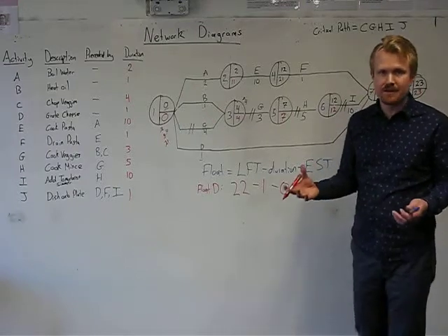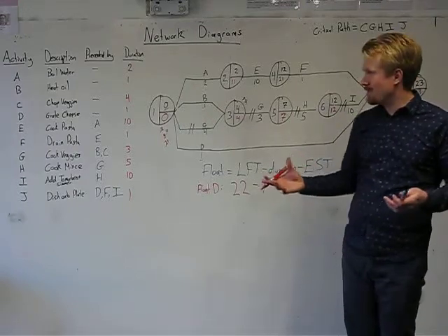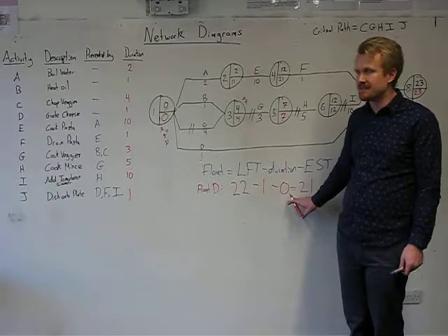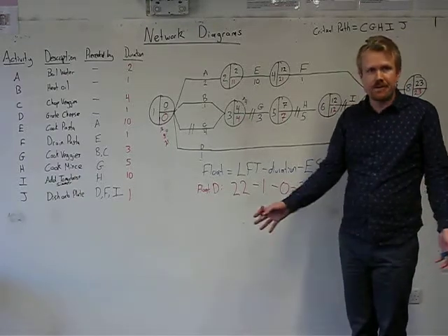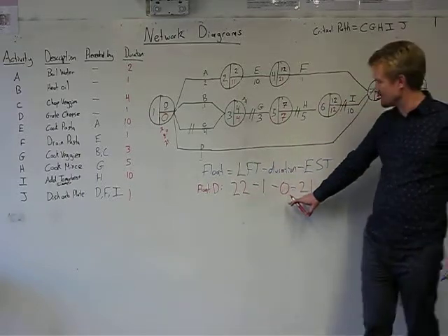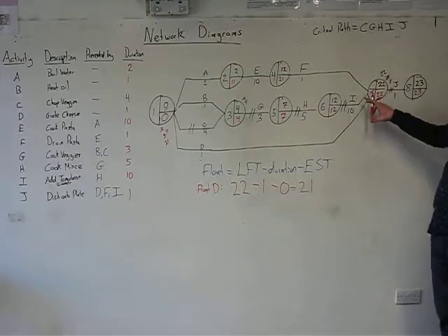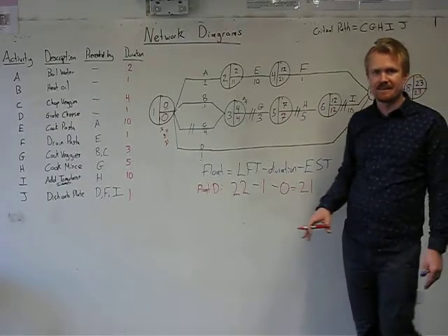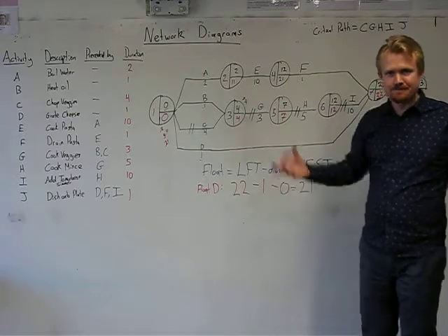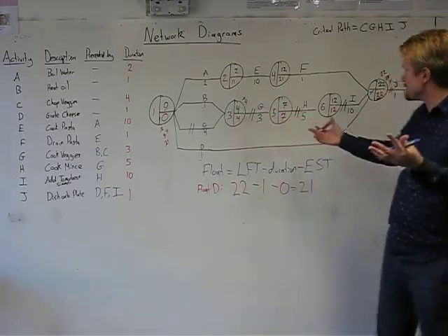In other words, we can wait around for 21 minutes while everything else is happening, and then say suddenly, oh, hold on, we need to grate our cheese. But as long as we do it before 21 minutes, because it only takes a minute, we'll get it done by minute 22, give us a minute to plate everything together, and we'll be done by minute 23 without delaying the project. We can do this for any other task along here.